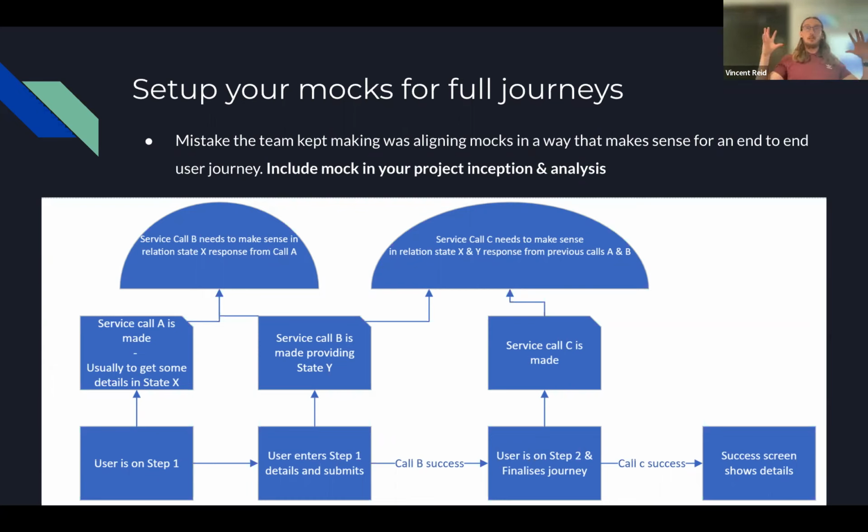This is something that I've seen a lot of people make mistakes on. Be cognizant, understand your journey, understand your endpoints, and start defining your mock configuration per user in a way that makes sense end to end for your journey. Obviously, you could have a journey that's 10 screens long. It means your mock planning will take a bit longer, but you might need to be pragmatic. Maybe you only want to build the first 3 screens to build that lead time. So try and be pragmatic in your mock planning.